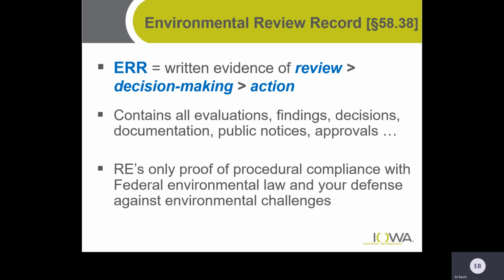The environmental review record, the ERR, is actually the written evidence of your review and the decisions you made and any actions that you take. It contains all of the evaluations, findings, decisions, documents, and notices. It's your only proof of compliance with federal environmental law, and it's also your defense against environmental challenges. And keep in mind that if you have someone, an individual or a party that wants to derail your project for whatever reason, an easy place to attack it is through the environmental review record. And if they find that that is flawed in any way, it will stop the entire project. So important to do this thoroughly and to document it properly.